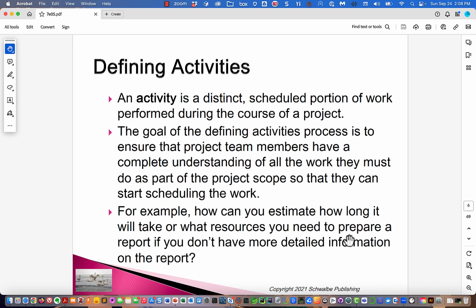So these are important parts of information, but normally the activities are direct activities that are going to produce the outputs that are in the WBS, and they don't include some overhead. And so when calculating the cost and when scheduling things, we need to take those other overhead activities and costs into account to make sure that we get a realistic schedule and we get a realistic budget.